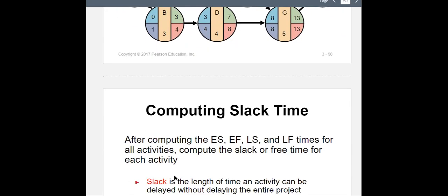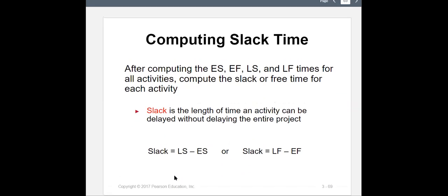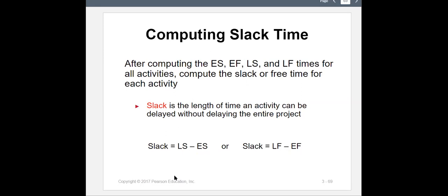So learning these is not just for a grade, it's not just for this class. Don't think about just this class. Learn this for getting a better job, making more money, and making your time more valuable, okay? So, computing slack times. Slack time, if you want to say it very shortly, means flexibility: which task is flexible and which task is not. If slack time is 0, that means there is no flexibility. If slack time is any other number, that means that task is flexible.